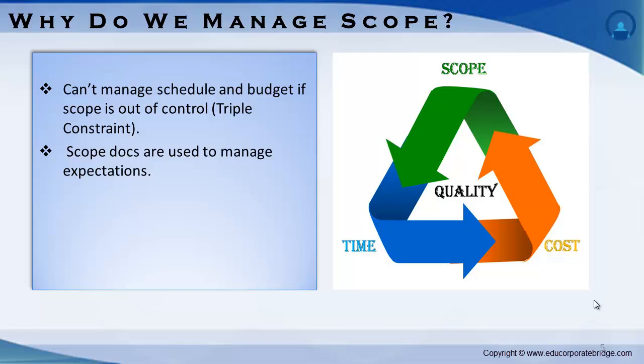During the initial phase, when the scope is being defined, any change in the scope will have the least impact on the project cost or schedule, as both of them have not been finalized yet, and no work has yet been done.